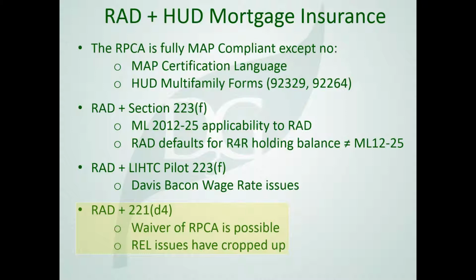And within the 221(d)(4) process, at the time of submission, the lender needs to provide a reserve for replacement deposit based upon the project post-rehabilitation. However, if the RPCA was waived, it is possible there is no reserve for replacement deposit created yet for the project. And for this reason, the RPCA becomes an integral part of the planning process for most substantial rehabilitations. Many industry practitioners, affordable housing consultants, and lenders still see the RPCA as a very important tool even with D4 structures, even though it can be waived.